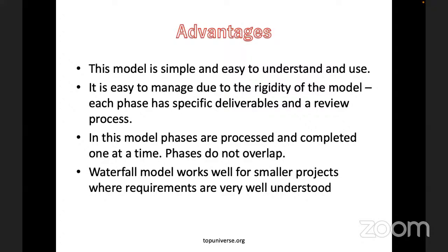So in the design phase, the developers can actually see what is wrong, and this will help to avoid wasting time in implementing all these designs and all of that. And also the total cost of the product can actually be accurately estimated, okay? And also the timeline after the requirements have been defined. So when we define the requirements in our PRD, our product requirement document, we can actually calculate the cost of this whole thing and how much time we're going to spend.